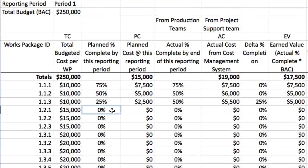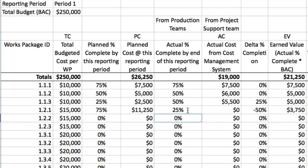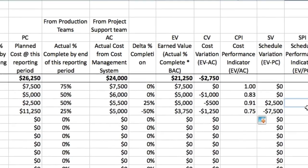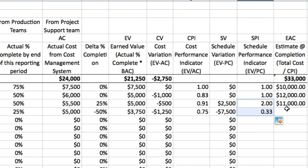Work package 1.2.1 is a different story. The planned completion is 75%, but the actual completion is only 25%. With a planned cost of $11,250 and an actual cost of $5,000, we are in deep red on both CPI and SPI, with an estimate at completion that is 33% over budget. Drastic action is necessary to correct this one.